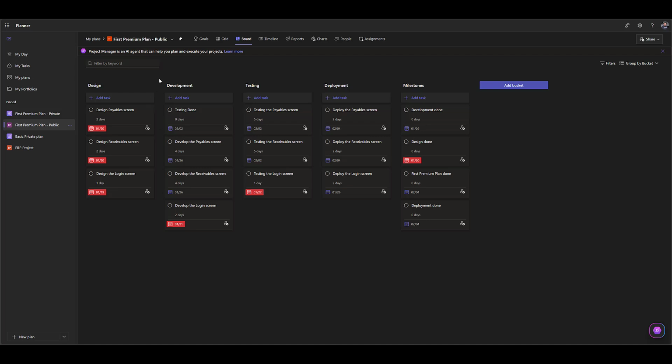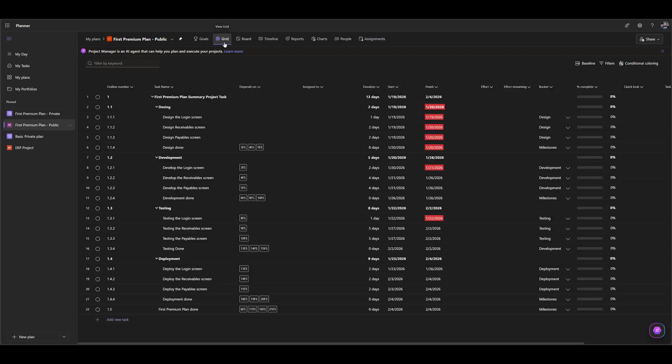It looks fine now. And last but not least, don't forget to assign people, one or more people, because if you don't have assignment, you will not know the effort. And what is the difference between duration and effort? I will show you in some of my next videos. But here I can go to assign, and let's say this is going to be done by John. This is going to be done by John. This is going to be done by, let's say, John and Mary, etc., etc.